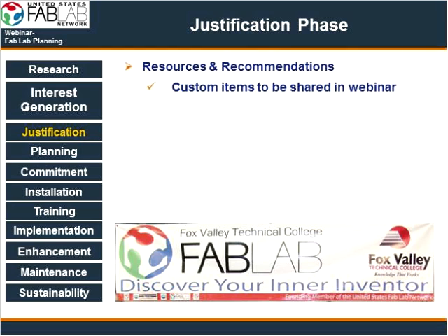If you look at some of the templates in our startup kit, as you start to build your own justification, before you move on to the next phase, you need to have all the key stakeholders, all the decision makers, review your plan and share some of the success stories of the other Fab Labs in the United States Fab Lab network, and really put together a justification package for your decision makers.